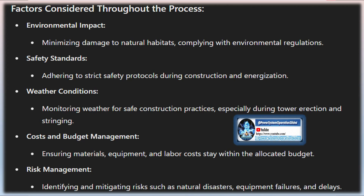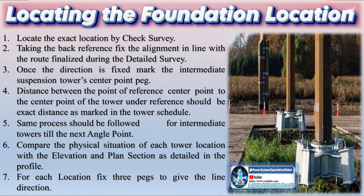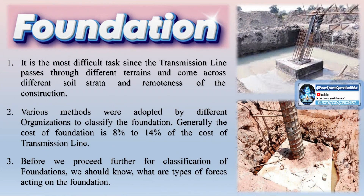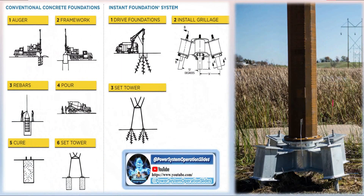Utility companies must obtain permits and clearances from multiple governmental agencies, including environmental impact assessments, land use permits, and safety certifications. This process requires close coordination with regulatory bodies to ensure that all legal obligations are met. In addition to regulatory approval, securing land access or right-of-way is a major task. Negotiating with landowners and local communities is essential, and in some cases utility companies may need to employ eminent domain laws to acquire the land, though this is often a last resort.